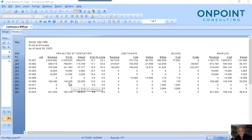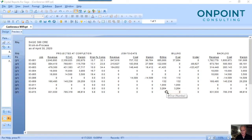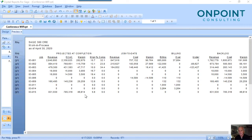As we go down, we've got a job here that may be a little pre-billing — maybe pre-construction or material. Nothing substantial there. And then one job that's purely backlogged and not kicked off yet. As you go down the WIP report, it's clear visibility to the story on each job — things that owners, execs, and key decision makers need to be aware of, not only for margin control and cashflow, but for planning resource requirements and where the company stands in its ability to cover overhead.